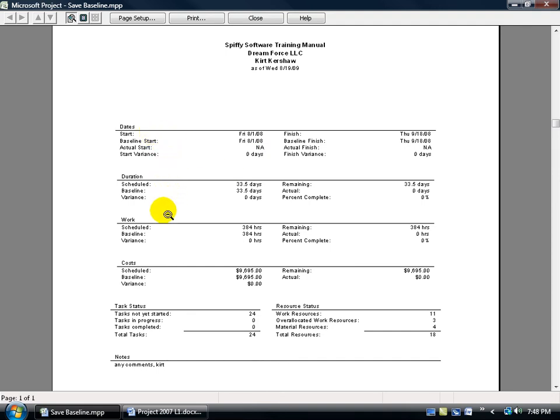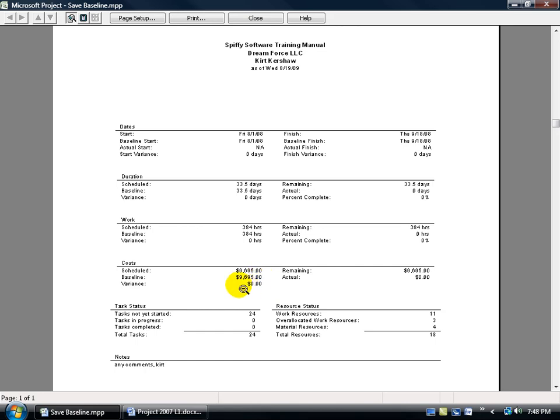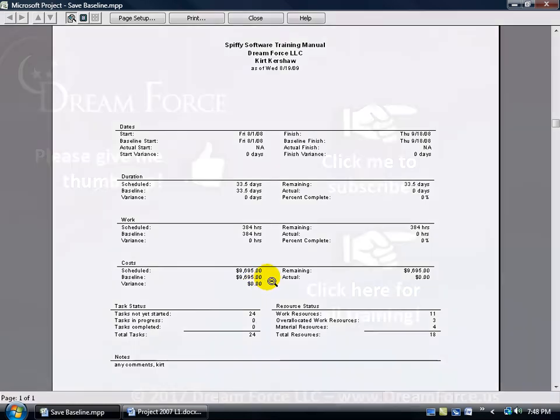Aside from your dates, you have the duration, you have your work, and then you have your costs. What you've got scheduled, a snapshot of that scheduled before you actually start the project, and then if that schedule or that variance from that schedule or baseline comes in either under $9,000 or over $9,695, you've got it here.